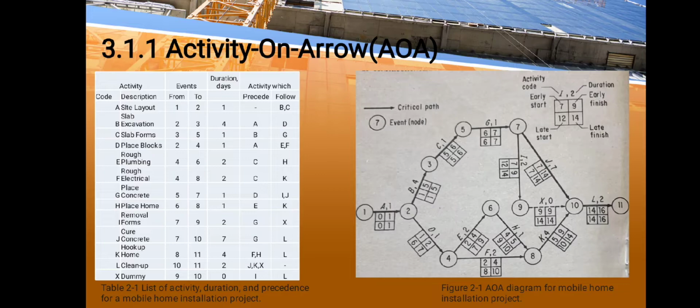Late start, or LS. This is the latest time an activity can be started without delaying the completion of the project. LS equals LF minus D. Late finish, or LF. This is the latest time an activity can be finished without delaying the completion of the project. LF equals LS plus D.